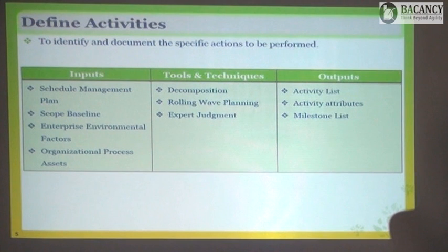In our project also, when we do the work breakdown structure, we can break down to the smallest level possible. Here we did the decomposition of the deliverable to the smallest level possible to have better control. But here we will have to use this judiciously. We cannot say let us break this into the smallest level possible. We will have to define the activities at a level where we can optimally put a control on that.